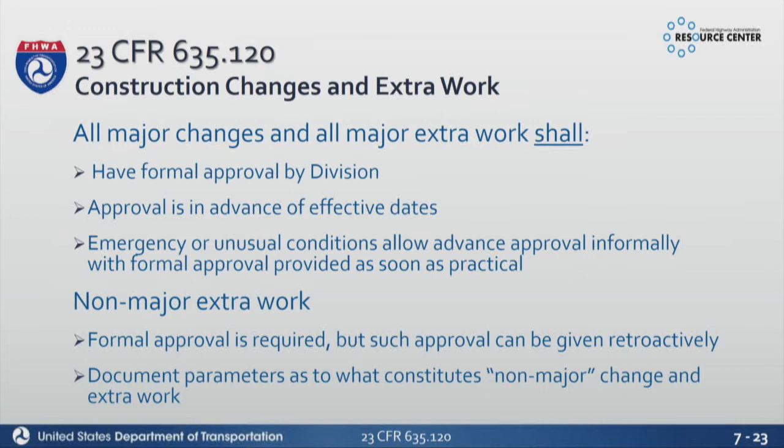So now let's talk about construction changes. And I kind of mentioned this earlier about major changes and non-major changes, and in regards to the stewardship and oversight. So we basically have allowed the states to assume the responsibilities to approve these. So you can see there, all major changes and all major work shall have formal approval by division, and approval is in advance of the effective dates.